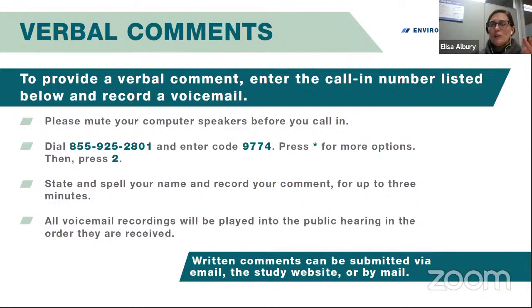So you're now looking at 60 decibels, which is 6 decibels below where your impact would be. So we do think we've got the design right on the noise wall, and that's why we're proposing to go with the 6 foot wall.